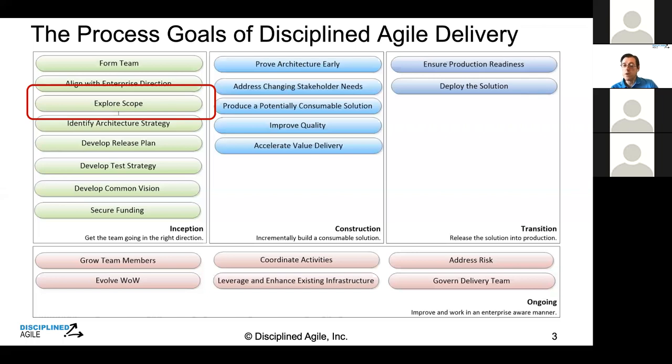That's also a good way, by the way, of building a business case for the next release. We call this continuous elicitation of requirements, not just a project mentality where you don't have any backlog to work from. It's one of the reasons, by the way, that inception can be greatly reduced or potentially even go away if you capture new requirements as you go. If they're not part of the release, then you have your backlog in place, ready for the next release without committing a week or two to do that.